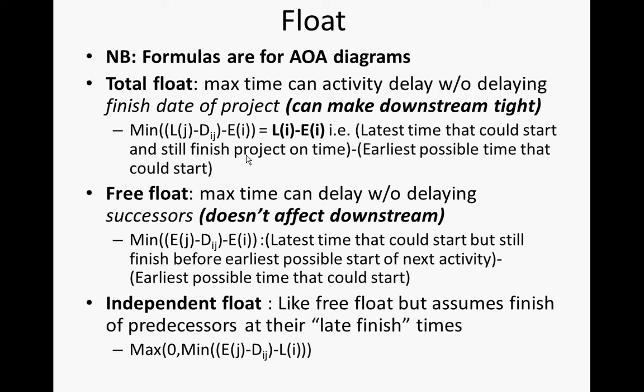So there's a notion of free float, which is the max time you can delay a given task without delaying any of its successors. Okay? And it turns out this typically is different from the total float. I think I have a slide in here which shows an example of this that I don't want to go into because of the time. But free float is a stronger notion of float, and you can burn your free float without affecting anyone.